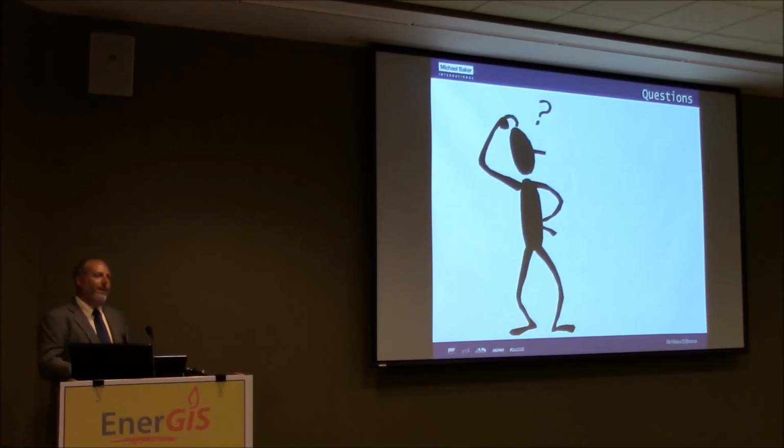What could potentially take time is the amount and type of data that we have. If we have to do some digitization or something like that, then obviously that's going to add to the actual time that we need to set the model up. If we've got a lot of data available to us, it's as fast as we can download that piece of data that we need to put into the model for analyzing. And there's a lot of manual interaction still too, to reclassify that raster data to get it into the model. So the actual click-run-to-end time for that segment isn't going to be very long, but you have a lot of legwork in there to prep the data to get it in.